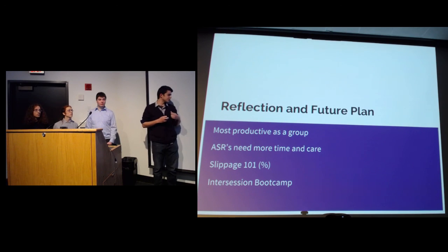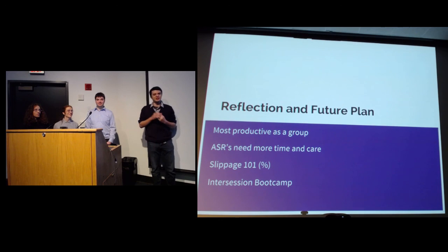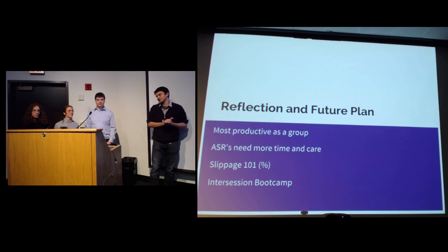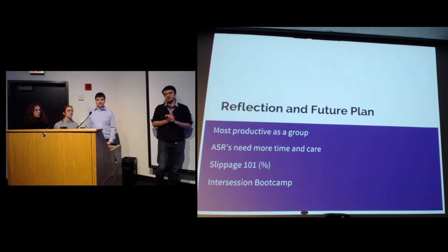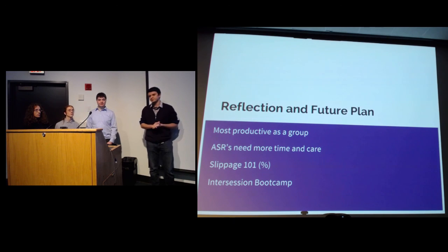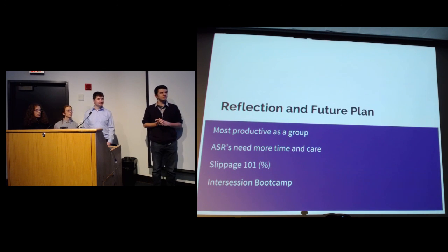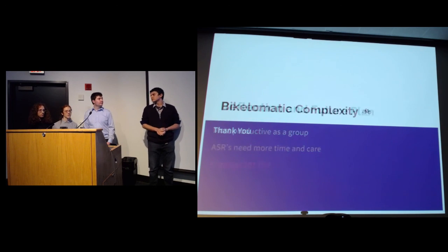And our solution to this is going to be this intersession boot camp. You might say this doesn't have a high chance of being successful, but the team's already committed to being here in Rochester in the second week in January, and we're working right now to plan out specific weekly deliverables. We're going to continue to have meetings with our sponsor weekly during that period. And we're planning on about 15 to 20 hours at least of group work in those 3 weeks. That's how we feel will be the most successful moving forward.